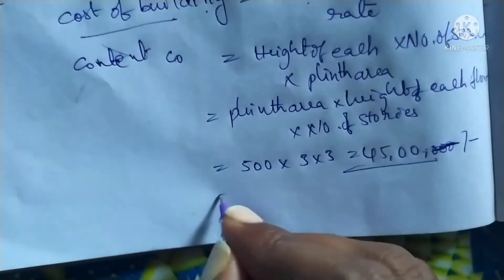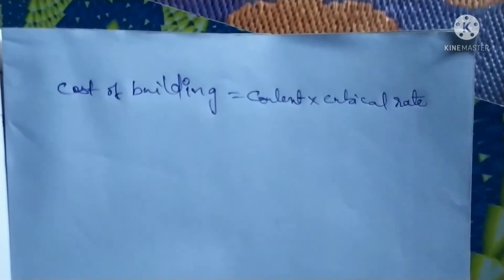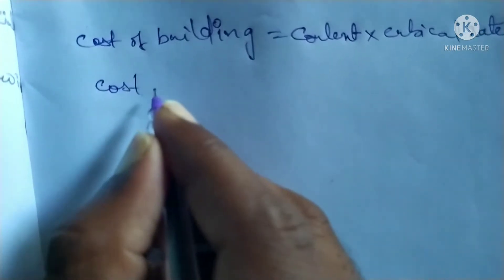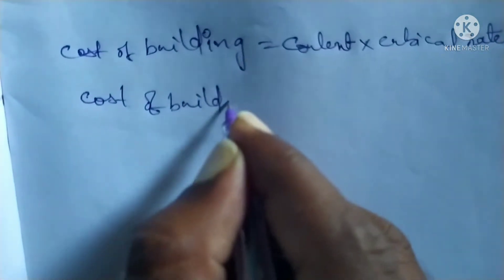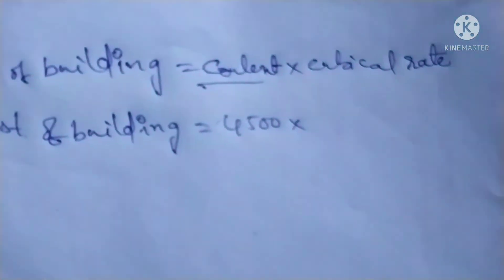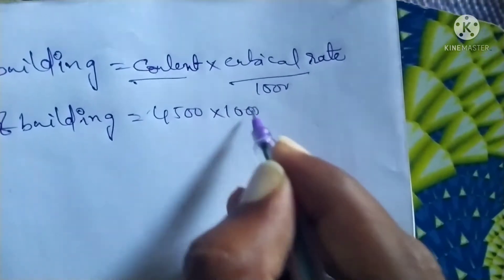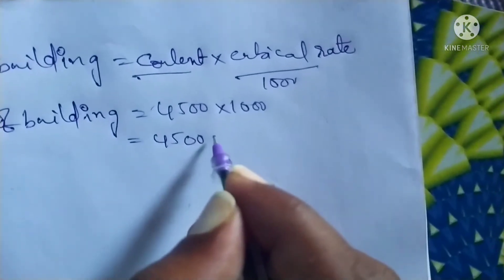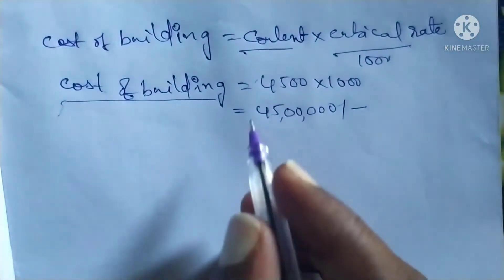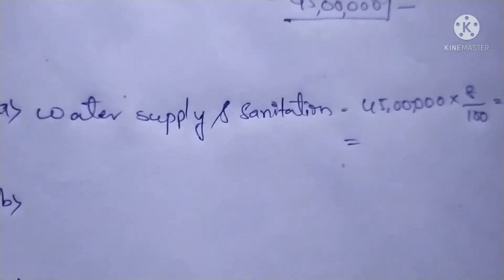Cost of building equals cubic content into cubic content rate. Cost of building equals 4400 into 1000 rupees per cubic meter — we got 45 lakhs. The cost of the building is 45 lakhs rupees.